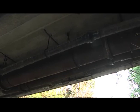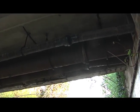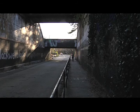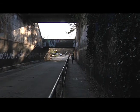The city can't take those water lines out of service until they make certain progress in accordance with the project that Jim was just mentioning. Once they get to points east and west of the bridge where they can tie in and bypass those existing lines, then we can take those out of service and take down the existing structure.